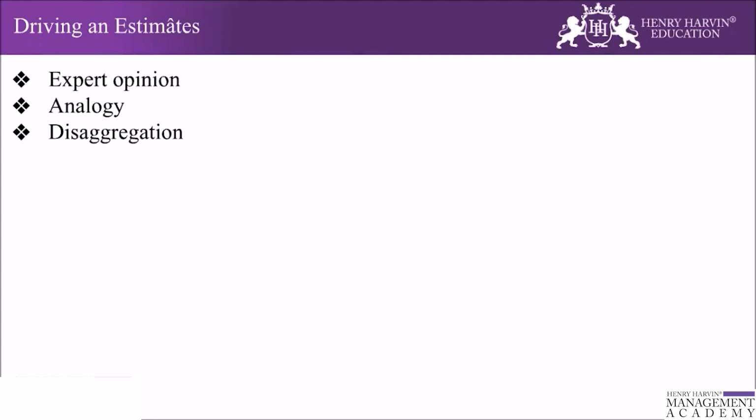So if most of the user stories to be included in a project are in a range of 2 to 5 days to develop, it will be very difficult to estimate a single story that may be 100 days. Not only are large things notoriously more difficult to estimate, but in this case, there will be very few similarly sized stories to compare to. Asking if this story is 50 times as hard as that story is a very different question than is this story about 1.5 times more than this story.